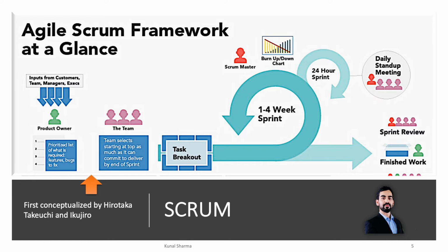Before the beginning of each sprint, the Scrum team selects the user stories based on the priorities and capacity of the next sprint. The list of user stories thus selected becomes the sprint backlog, and the meeting or event or ceremony in which the team does so is known as the sprint planning. After this, the sprint kicks off. Now, team members will individually as well as collectively work towards the sprint goals.